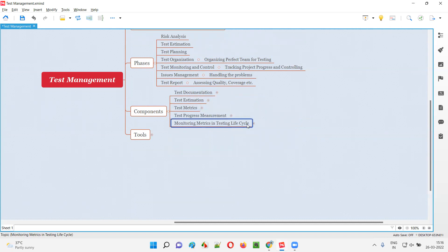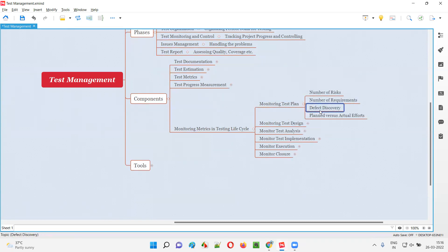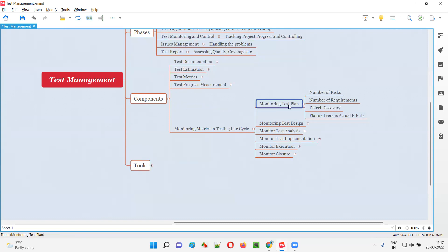On top of that, monitoring metrics in the testing lifecycle — we have to monitor and control. If things are not going according to the plan, we have to control and bring it back to pace. As part of monitoring metrics, we monitor the test plan — whether the things in scope, the environments to test, schedule, resources, and deliverables are happening as per plan. Number of risks resolved, number of requirements covered, defect discovery, and planned versus actual efforts are all monitored.